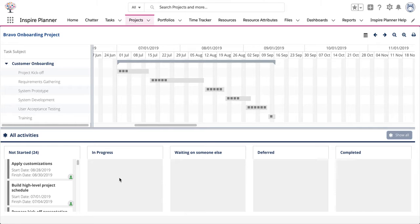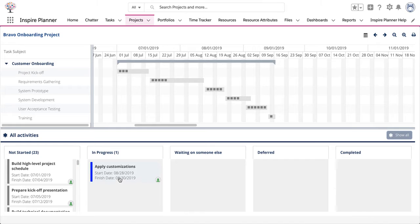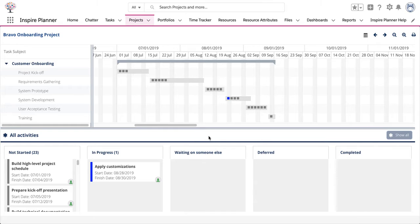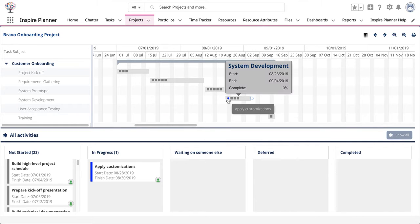To change the status of a task, simply drag the task to the appropriate column. Inspire Planner will automatically update the task status and change the card color to reflect its status. You'll also notice that the Gantt chart above also changes the color of the square representing the task according to its status.